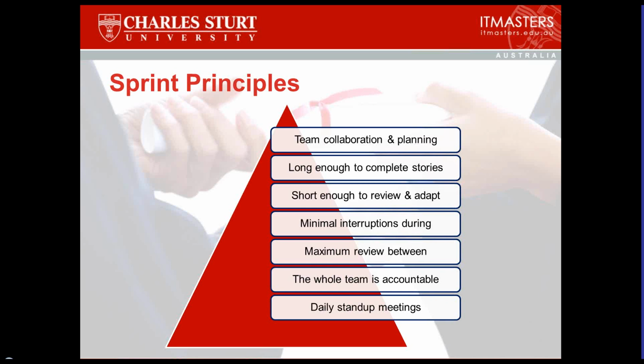Well, the product owner is not the Scrum Master. They need to be different people in most cases. So generally, if there's not a strong working relationship and not a degree of trust, then you'll find a product owner butting in on the Scrum Master's activity, because the product owner is the one responsible for the product backlog, not the Scrum Master.